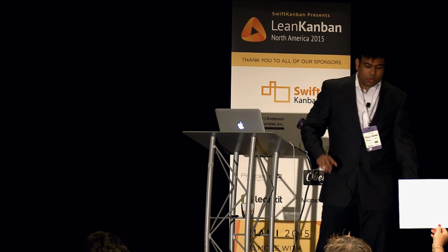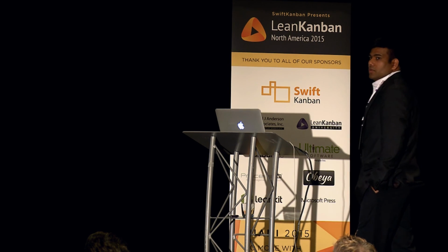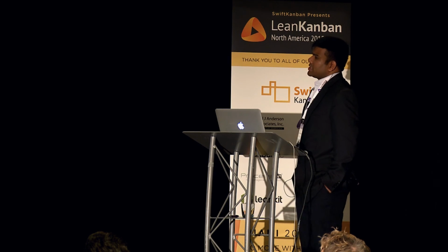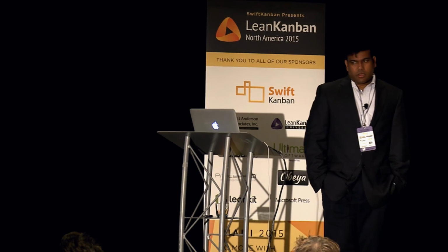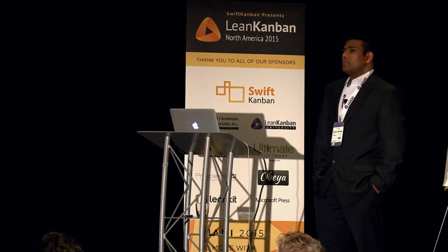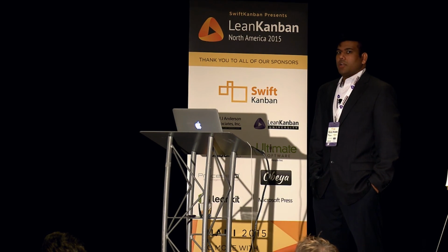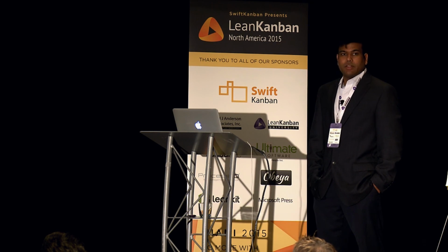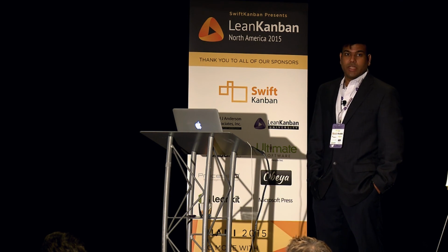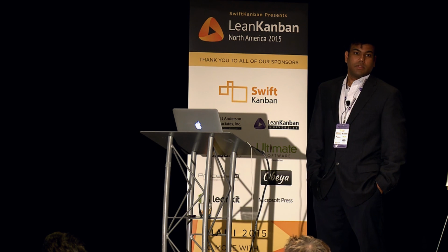This is an important one. Typically you have, and I know Jesper yesterday mentioned that the new recommendation is actually 3 to 9. And deciding arbitrarily what the team size should be is also another pitfall typically. Scrumban can help you identify the dependencies, and thereby you can actually identify who should be part of the team.